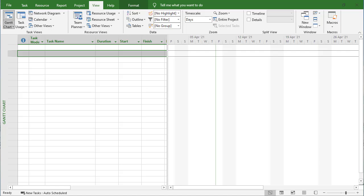You don't want to create a work resource because that'll consume hours and that's not what we want. We've got a material resource such as fuel, and in this case we need to create something that's variable and can adjust as the time adjusts. I'm going to show you exactly how to do that.